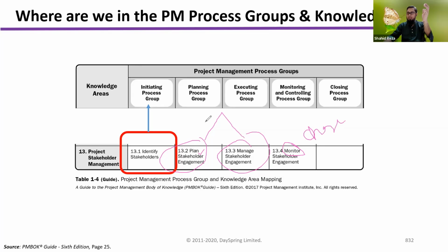That means the plan is not working, or the stakeholder you have identified has already left the organization, and a new stakeholder has joined. So now your responsibility is to change the stakeholder list and update it with the new stakeholder's requirements, influence, and power, and understand his or her requirements. So these are the responsibilities and the scope of this process, monitor stakeholder engagement.